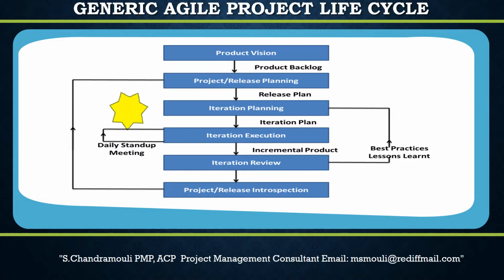In Agile projects, the customer requirements are called backlogs. Product requirements, called the product backlog, is created as an outcome of the product vision phase of the project. Product visioning, this planning helps to get the commitment from all the stakeholders involved in creating the product, by determining cost, time involved in each level of the iterative cycle.